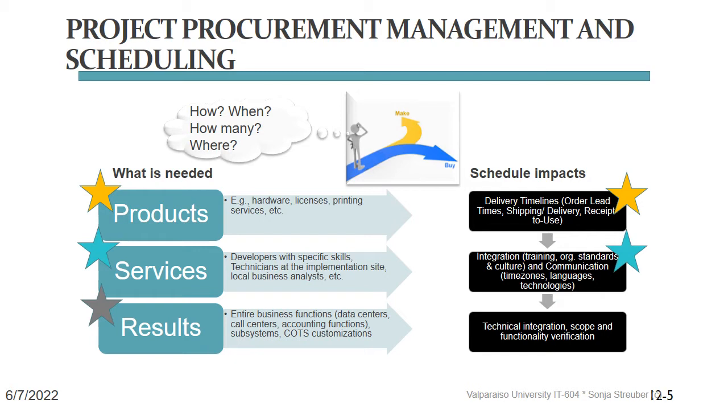And it is this expanded integration testing of your subcontractor solution that needs to become part of your WBS with a realistic activity duration estimate. For this, always remember the 10% reserve to plan for extended bug fixes and retesting.